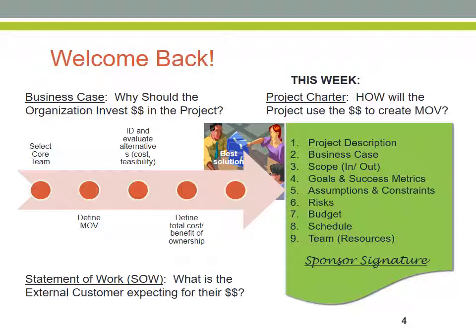But most importantly, let's remember that a project does not exist if the project charter has not been signed by the project sponsor. The project sponsor signature is absolutely vital in order to not just authorize the existence of the project, but to authorize the powers of the project manager to go forth and to spend the allocated budget for the project. Now, a project charter can come to the project manager through the business case.